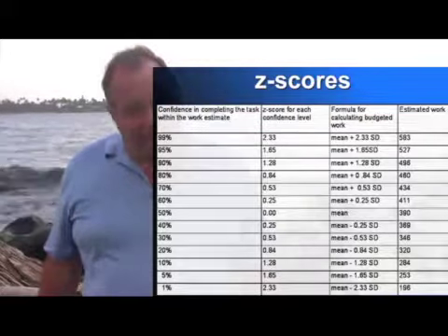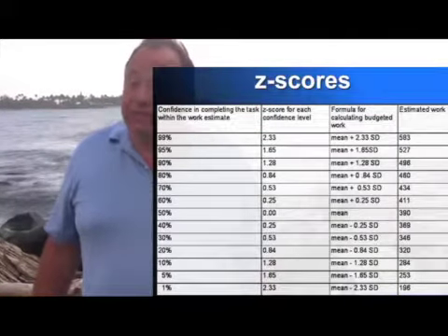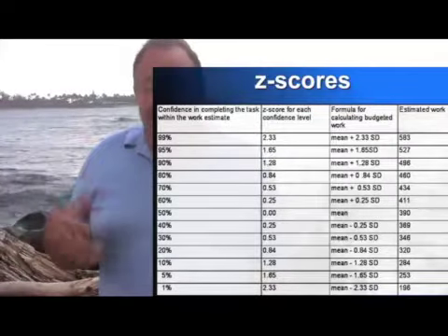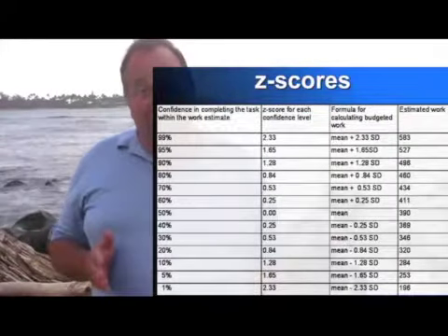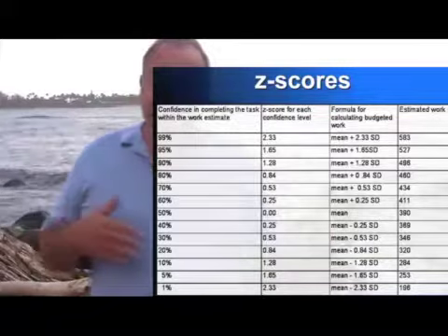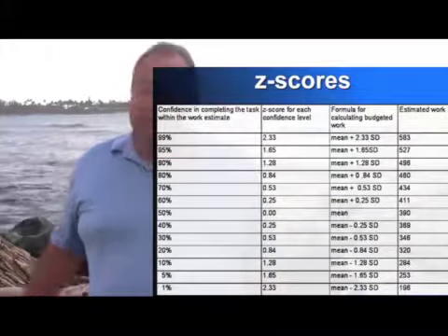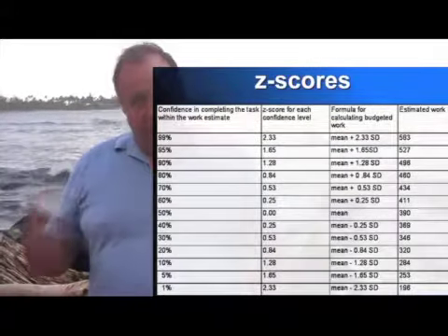Their favorite is 100%, but you'll quickly see that to get to 100% certainty, that's impossible. To get to 99.9% certainty of finishing on time, you may have to have 5 times the best guess estimate. So it's good to educate sponsors to that risk-reward combination, and PERT lets us do that.